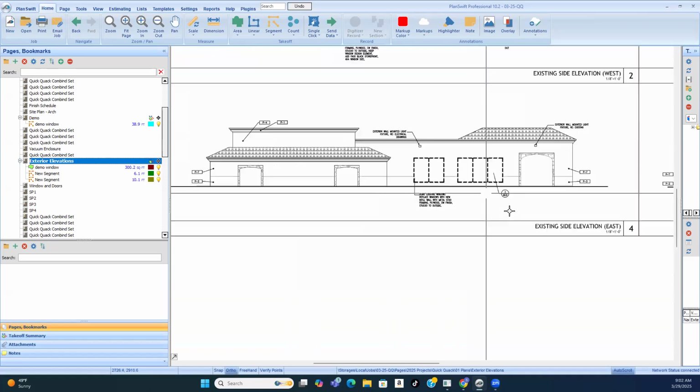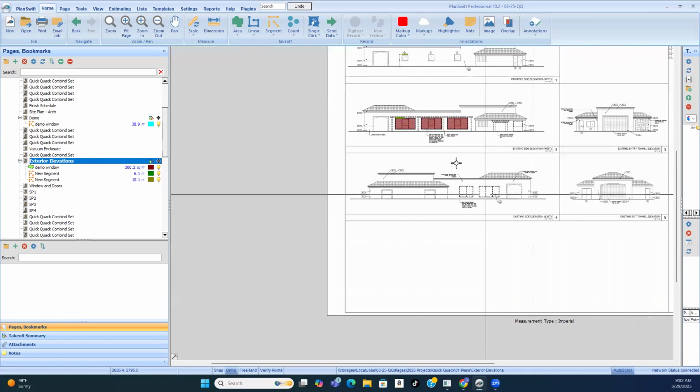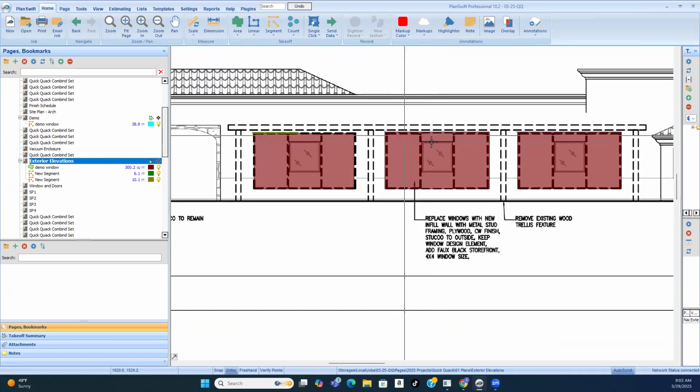What they did is they just put everything on one sheet, which is good because, like I said, when you demo windows or glazing, that's a square foot number. It's not a linear foot number. Anything with a square feet area is by square foot. Just like when you demo walls, you price it by the square foot. Windows are square feet. If you're demoing flooring, that's an area, you price it by the square foot. If you're demoing curbs and gutters, that's a linear foot. And so when you're doing windows, you always want to make sure.